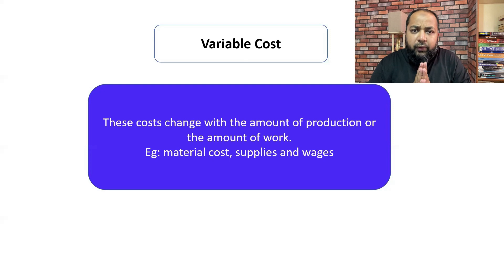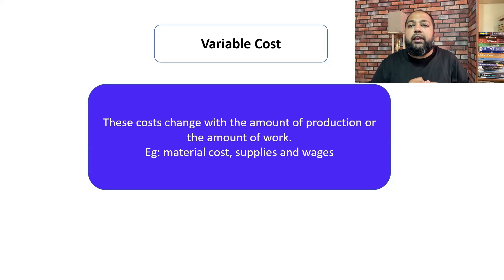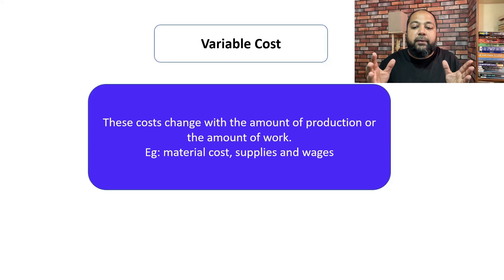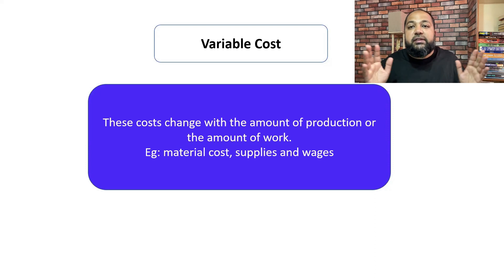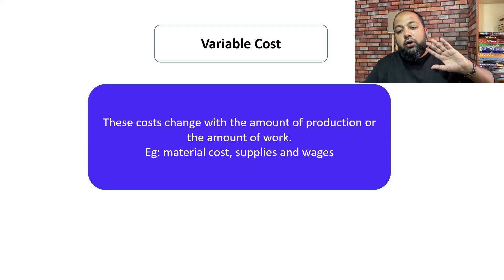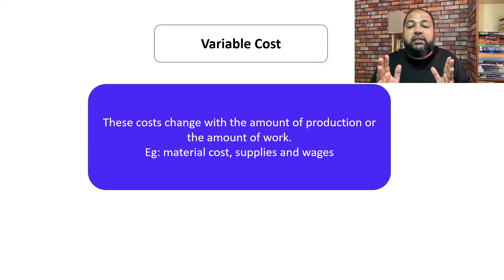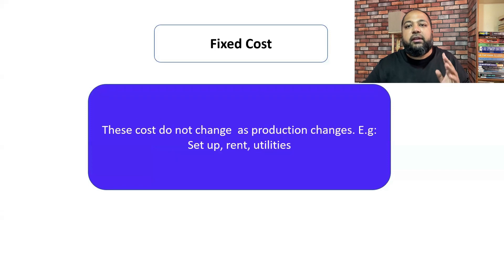When estimating the project, there are different kinds of costs you incur. Variable cost: if you have a senior person their cost will be more; a junior person will cost less, so wages vary. Supplies of lower quality cost less, better quality costs more — so materials and wages vary. These costs change based on the amount of production or work getting done. If people work longer you pay overtime — all this is variable cost.